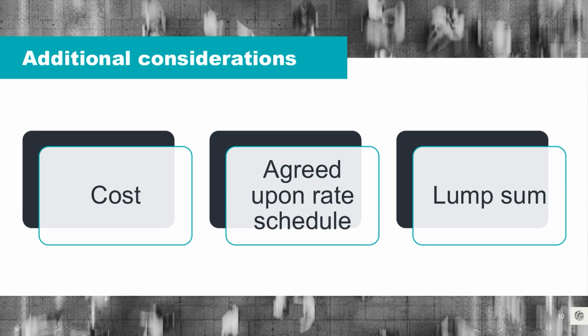This is your labor rate decomposition. So looking at the wages, benefits, taxes, and overhead. You want to compare the rates to industry standards, prior projects you've completed, union agreements, other published indices, to avoid overpayment. As we talked about with escalation, here it's important to understand how and when these rates can be increased, and we need to tie these to both objective benchmarks and documentation requirements. And here we need to ensure the roles and responsibilities match the rates applied to prevent misclassification of costs.